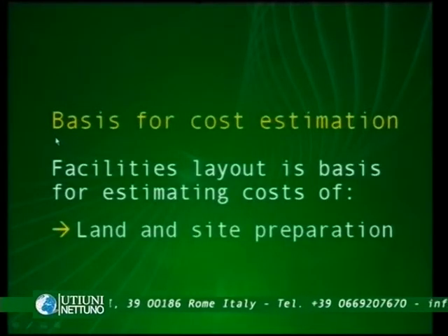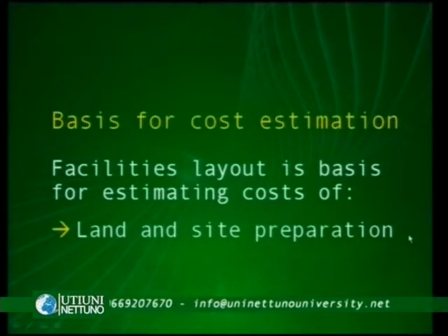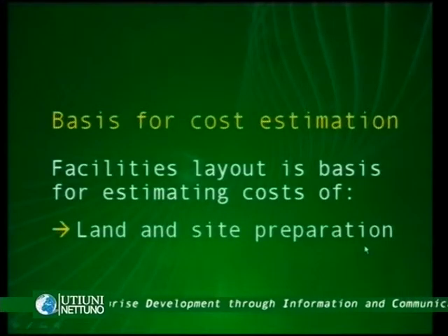So basis for cost estimation. Facilities layout is basis for estimating cost of land and site preparation. So, just recall some ideas from the previous classes. No matter if the investment is a greenfield or a brownfield one, we need land and site preparation. Of course, if the investment adopts a brownfield approach in the area where we're installing the capacity, probably some service or some infrastructures are already present. If it's instead a greenfield operation, then we have to prepare the site in a proper way, meaning that the company should consider the installation of infrastructures like utilities or the connection to some utilities and things like that.